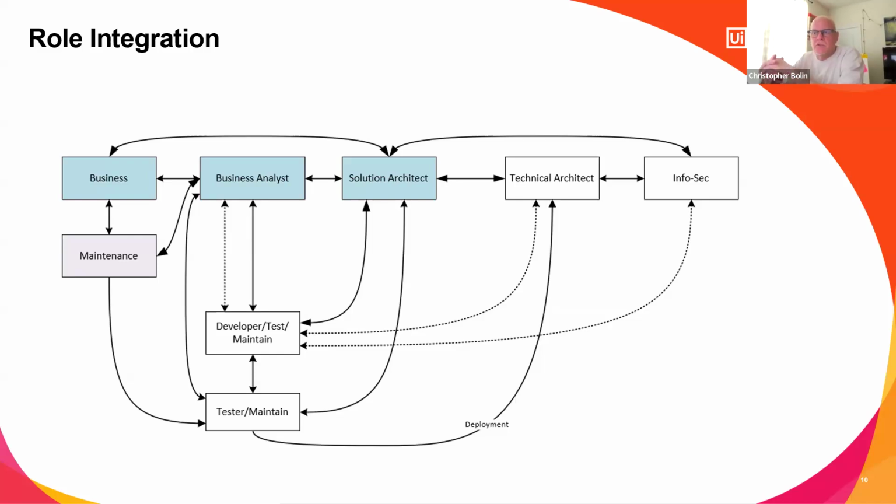On the commercial, non-public side, I've seen hypercare last 2 or 3 weeks. I've seen it last 30 days. I've never seen it last 60 to 90 days. But your developers can be involved in hypercare, because hypercare is the promise to the customer that we will devote resources to making sure that once this is released into production, it is operating in production as we intended and as we built it to operate and test, because the developer is typically not building in a production environment. He's building in a test environment.